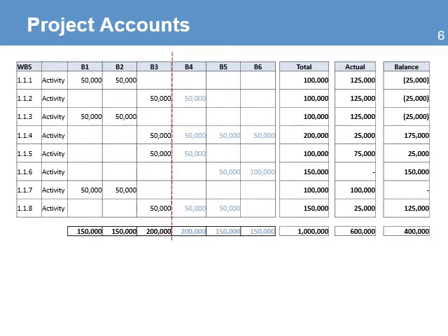Let's look at an example of the project budget accounts to have a better understanding on how to use earned value. When you develop the budget plan, you identify for each activity a cost and a schedule that shows you when you're planning to use the budget. In the example, each column shows you the value for 2 months on a 12-month long project. The total budget is $1 million. Let's make an analysis at the end of month 6.